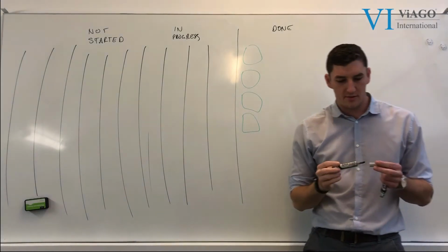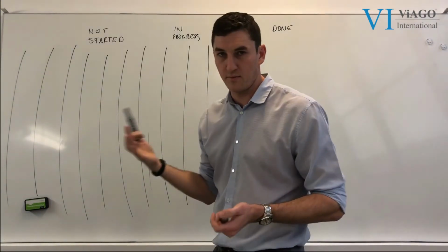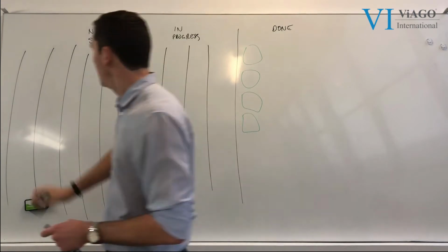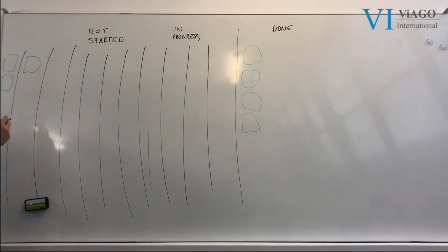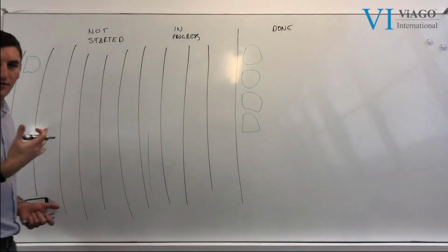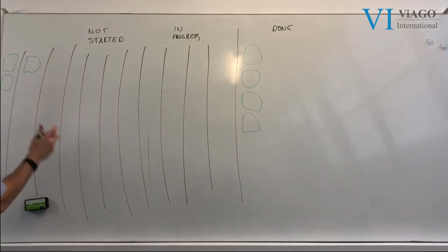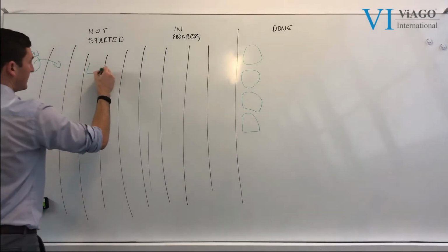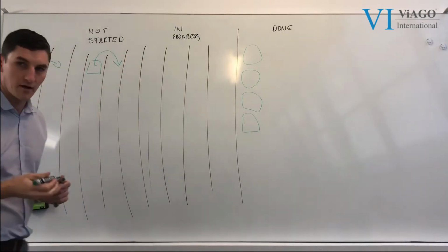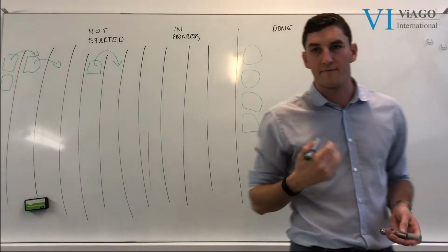And what you do is you take a card once it's ready to be worked on, and you put it on the board, and as they progress with time, each day you move them over. So each day you come in and you move every card over 1 slot, based on when it first came in.